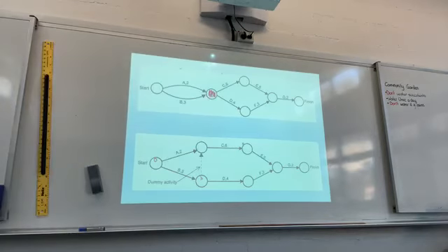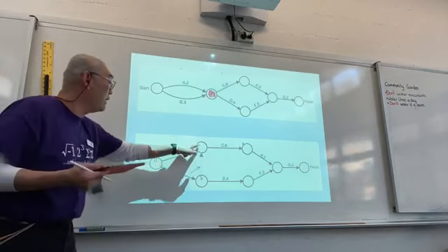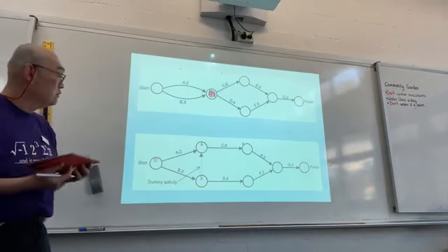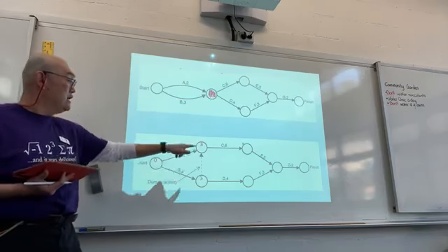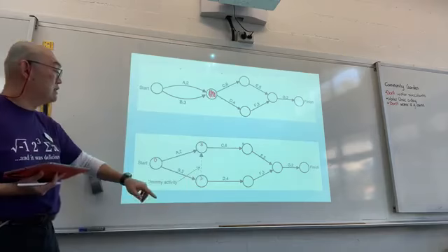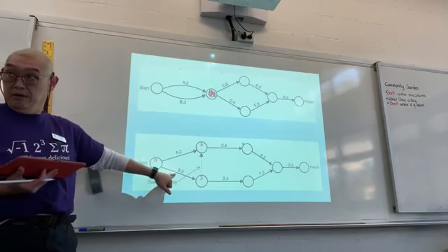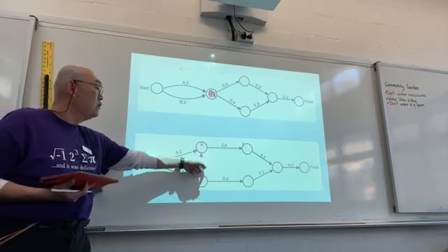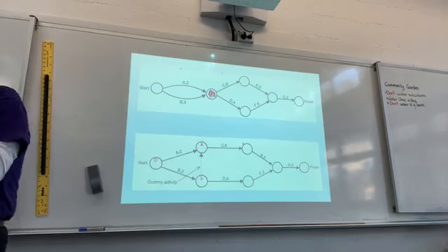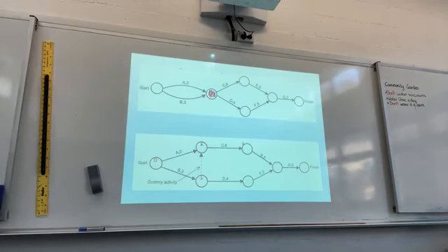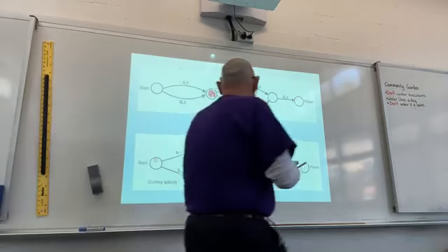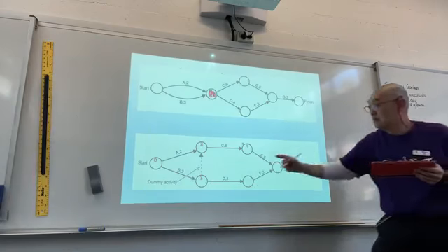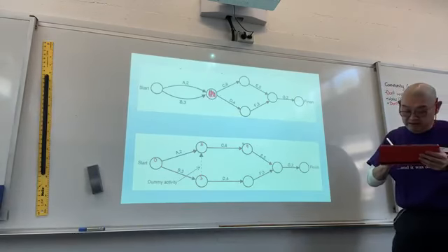You must include that. So you know that over here, the earliest starting time for C will be 3, because the immediate predecessors for C are A and B. There's no duration, but you need to consider that when you analyze the network. Once you've done that, we can move straight on to this too, which is 3 and 6. That is 9. 3 and 4, that's 7.